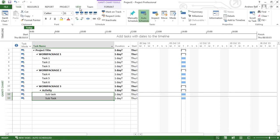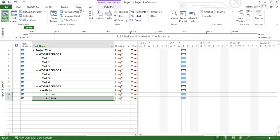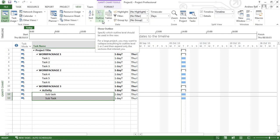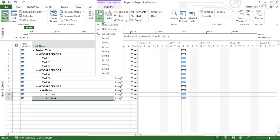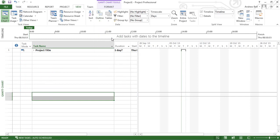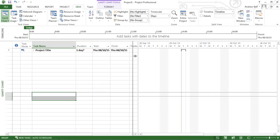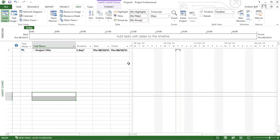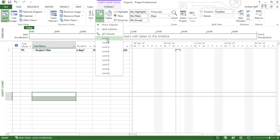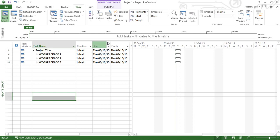So to control what we see in Microsoft Project, let's go to the view tab. On the view tab, we have this outline, and we can pull that down to say we only want to see the level one project tasks. In this case, it's the title of the project, the only thing at level one. This might be a very simple project plan to show the senior managers. They only get to see when does the project start and when does the project finish. The middle management might want to see level twos. This is telling them when the project starts and finishes, but when the work packages start and finish.